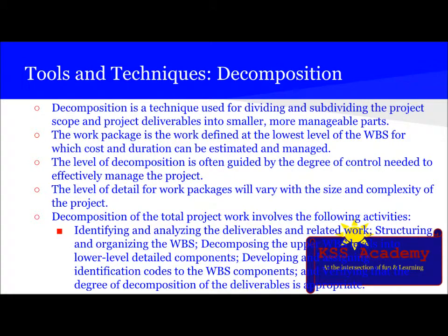In case of decomposition, it's a technique used for dividing and subdividing the project scope and project deliverables into smaller and more manageable parts. The work package is work defined at the lowest level of WBS for which cost and duration can be estimated and managed. The level of decomposition is often guided by the degree of control needed to effectively manage the project. The level of detail for work packages will vary with the size and complexity of the project.